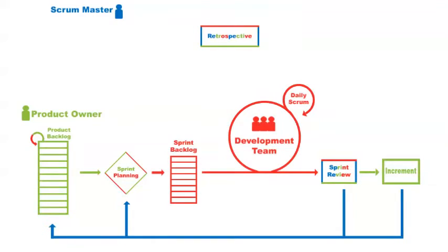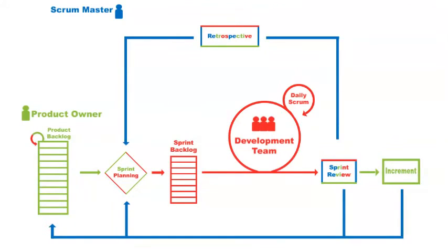The Retrospective. The retrospective is the opportunity at the end of the sprint in which the Scrum team can inspect its implementation of Scrum as a process framework, the interactions of the people within the team, as well as any required skills in order to deliver the solution, while reviewing these to consider opportunities for continuous improvement. This provides a continuous improvement feedback loop for the Scrum team, which should take at least one continuous improvement goal into each sprint as a target to achieve.